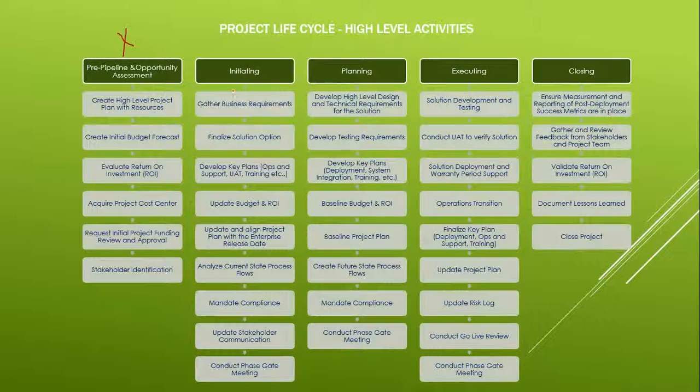Update budget and ROI. Now you have some more details, so you need to update the budget and ROI because now you will have a little more precise number. When I say you, this means the PM will be doing it. Update and align the project plan with the enterprise release date. If there are fixed release dates followed in the company or the corporation, you need to stick to those dates and match them to your deployment.